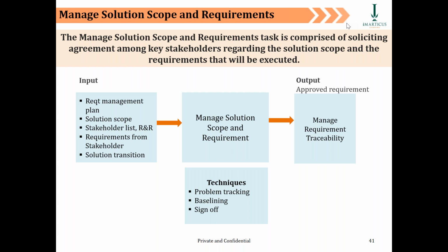Hence you will have to send all such requirements back to the client and tell them that these are additionals, and if they want them to be part of this project, then extra commercial terms will be applied to them.